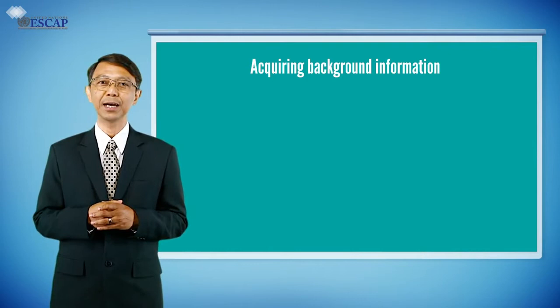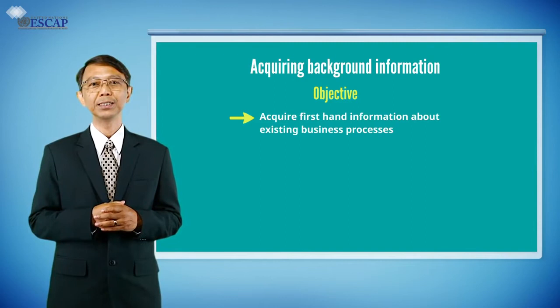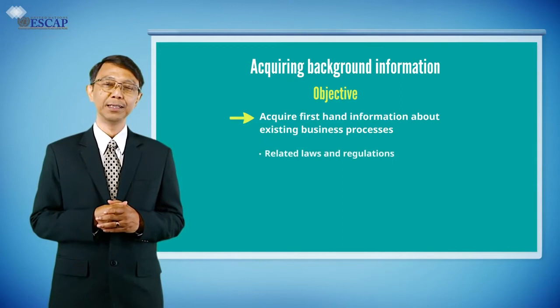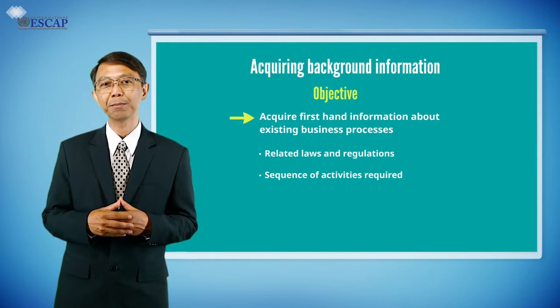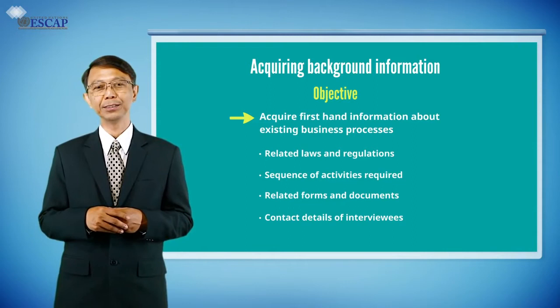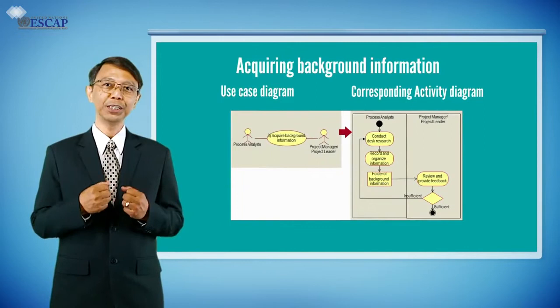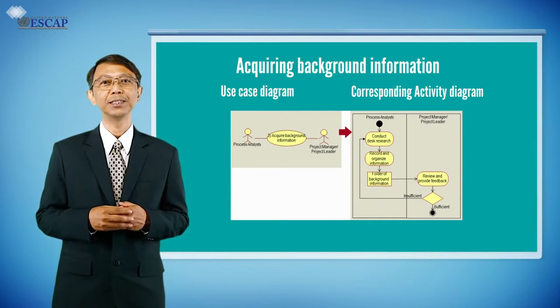The objective of this step is to acquire as much first-hand information as possible about existing business processes in the scope of our analysis, including information about related laws and regulations, sequence of activities required to complete each business process, related forms and documents, and contact details of potential interviewees for further investigation. Process analysts of the BPA project team need to work with management support from the project manager to conduct this research from several available sources.